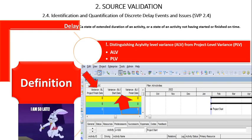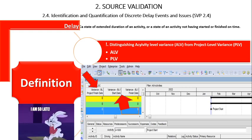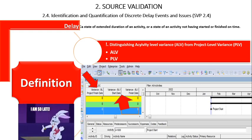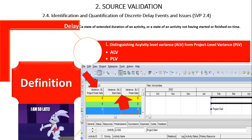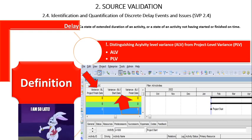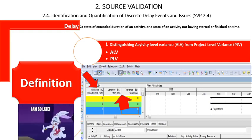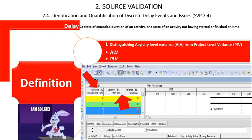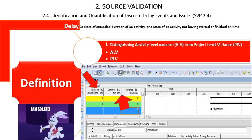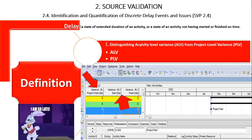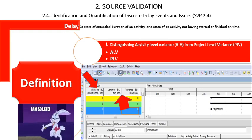Project-level variance is also a variance, but at the overall project level. While activity-level variances occur close in time to the causes — that is, in the same period — the project-level variance may be months apart from the actual cause. Project-level variance is the result of the aggregation of activity-level variances after taking into account network float. Activity-level variances are considered delays regardless of the amount of float they carry.